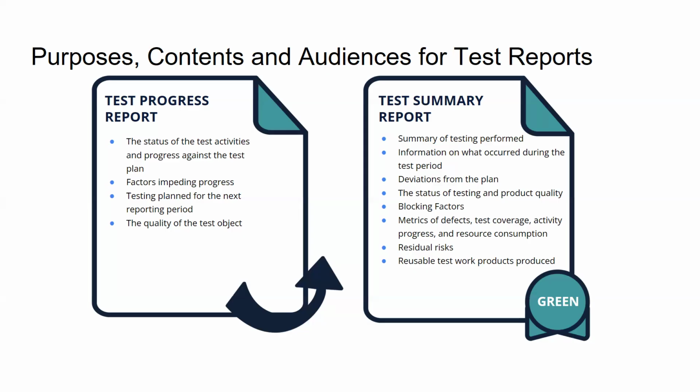So on a daily basis, we have an understanding. Okay, yesterday we had completed around 70% of testing. Now we are at 72. By the next 2 weeks, we have to complete it. Whether we can complete or not, we can also determine using this test progress report, right? The next one is the test summary report, which we are going to send once we complete the testing, right?